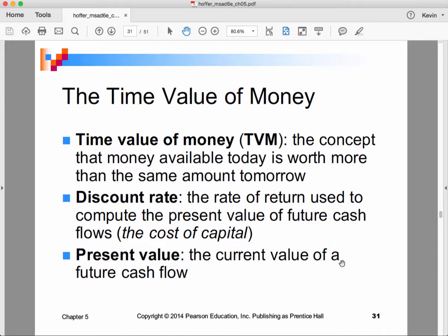So we definitely would pick a rate that would not be lower than what we would earn on our money if we saved it, and would not be higher than what we would pay for money if we were to borrow it. And how exactly to pick a value along that continuum, well, that's what financial people are for.